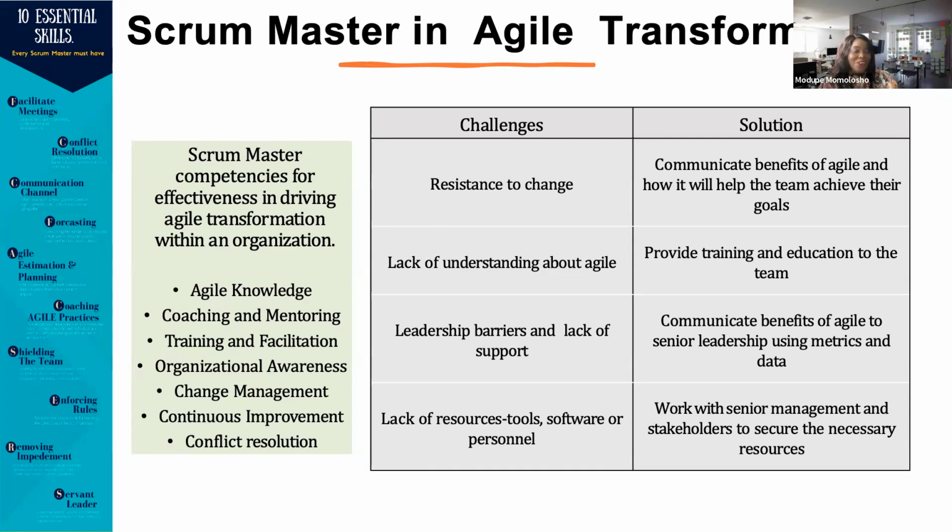No. And then another one that brings to mind is some teams. So when we transition and we start off, because some of our team members are coming in with the old mindset, now we're having Waterfall within Agile. So it's waterfallish, but we say we are doing Agile. So for example, we write user stories that are not end-to-end, just development stories. And then in the next sprint we design. And then in the next sprint we test. That is waterfall.